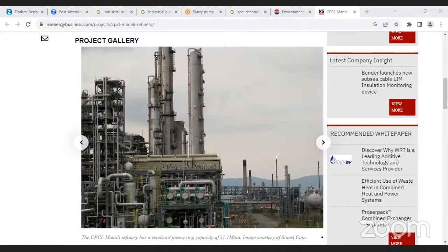PNIDs form the basis for engineering and construction. Process and operation take inputs for making procedures like startup, shutdown, commissioning, and the cause and effect diagram for the instruments. Mechanical takes data sheets, isometrics, manual valves, insulation thickness. Instrumentation takes data sheets, control valves, shutdown valves, control scheme, interlocks. And electrical takes heat tracing requirements, interlocks and motors for the pumps and compressors.